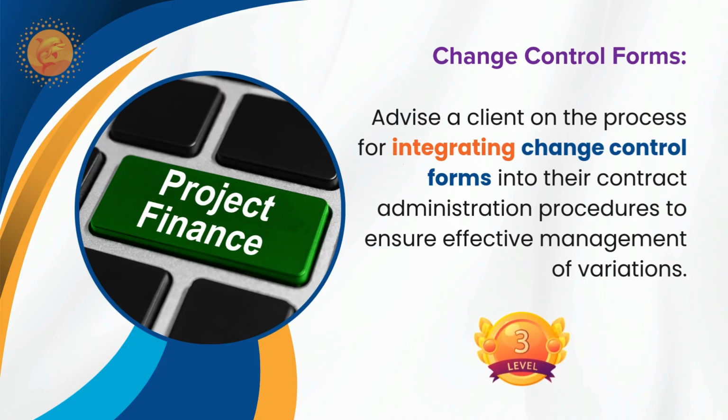After that, they have the format agreed value instructed, AVI. This is the final value format, finally used when everyone has agreed. When contractor and client are clear, then we put the information in the agreed value instruction. Okay. Thank you for that. Anyone else wants to add something?